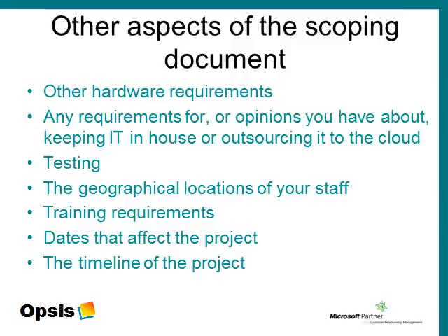The availability of any resources that you require. Typically this will be external consultants or other resources that the project requires for a short time. The required due date. Must your project be in by the beginning of the financial year, or by the beginning of the month, or by some other date? If this is true, it needs to be checked and the project plan needs to be managed towards it. And finally, what are the delivery dates of any new hardware or anything else that the project is purchasing? These dates need to be known, because if they are late, they can push the remainder of the project late.